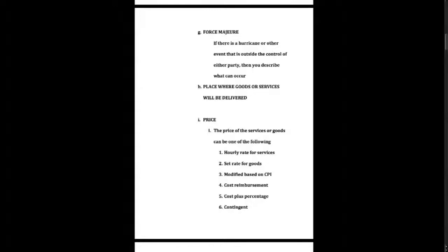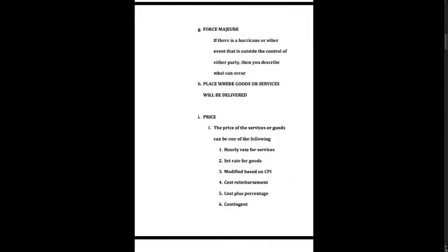What's the price for the services? Is it a set rate? Is it an hourly rate? Is it modified based on CPI? Is it a cost reimbursement contract? Is it a cost plus agreement? Is it a contingency agreement? Many legal fees are on a contingency, especially personal injury. Construction contracts are usually based on progress payments. Professional services agreements are usually based on an hourly rate.